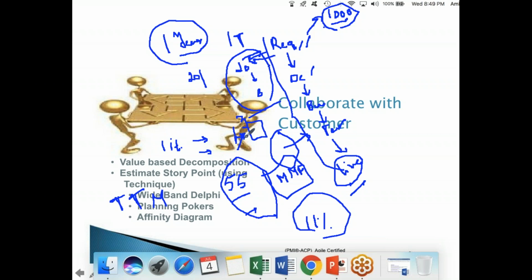And one more advantage with Agile is you do the testing very frequently. How frequently do you do it? Every iteration. Because every iteration you will collect the requirements, you design it, you are going to build it, you are going to test it, you are going to release it to live. Remember, we are doing all these activities in traditional also, but we are doing them only once in a lifetime. So testing is done at the back end of the project.